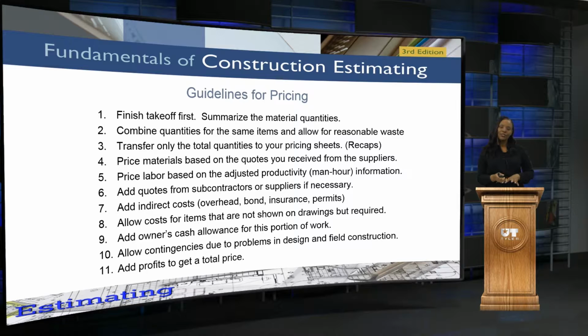So that's when it gets into really your overall due diligence that you did in the very beginning stage of, should I bid on this project or should I not bid on the project? That's where all of this comes into place. All those extras that you really thought about when you went out and you visited the site. You should have taken note of some of the things that maybe you don't see on the drawings or maybe you don't see in the project manual. So the site visit really does help bring up various issues that you may not have even thought about. So we're going to account for as much as we possibly can, but not over the top. We're going to try to find that balance in that even margin area.